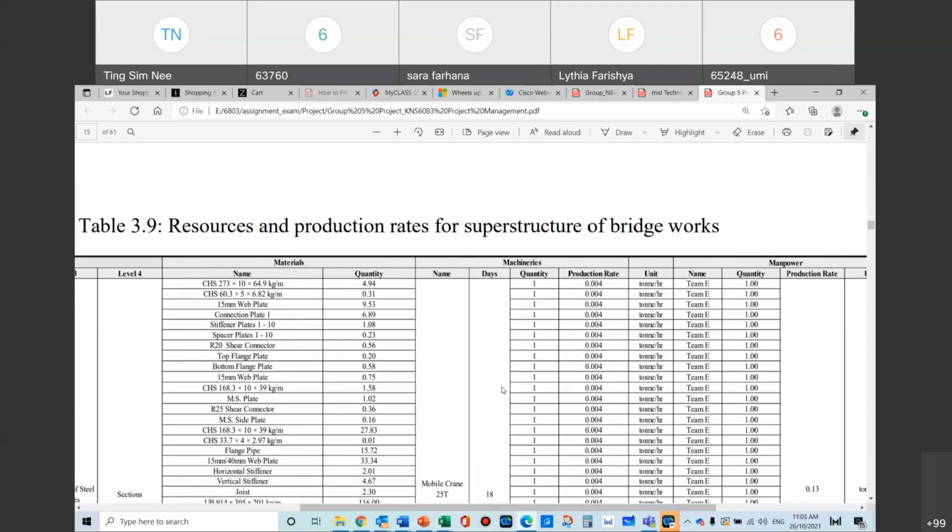Between the two of them later on, you will produce some timeline, some duration, because both of them have production rate. Some activities, the machinery cannot do so many jobs. The people can. Some of them, the machinery is ready, but the people cannot do so many things in a day. So depending on which production rate is going to govern, your schedule, your duration, is going to be based on that, you know.